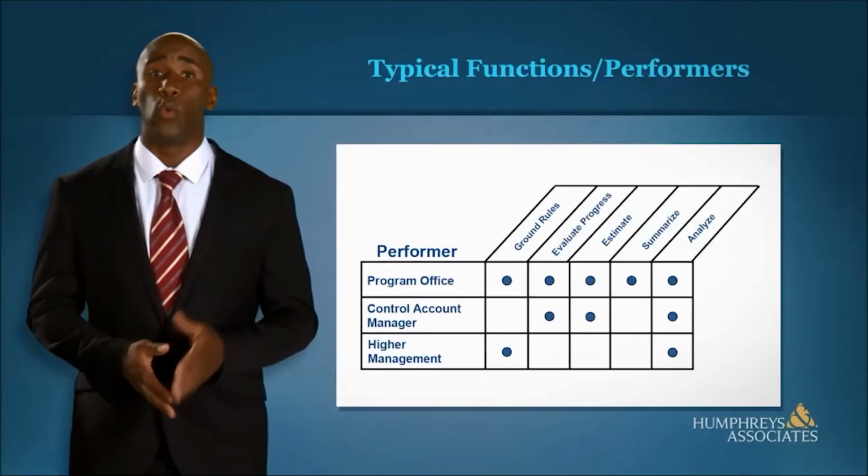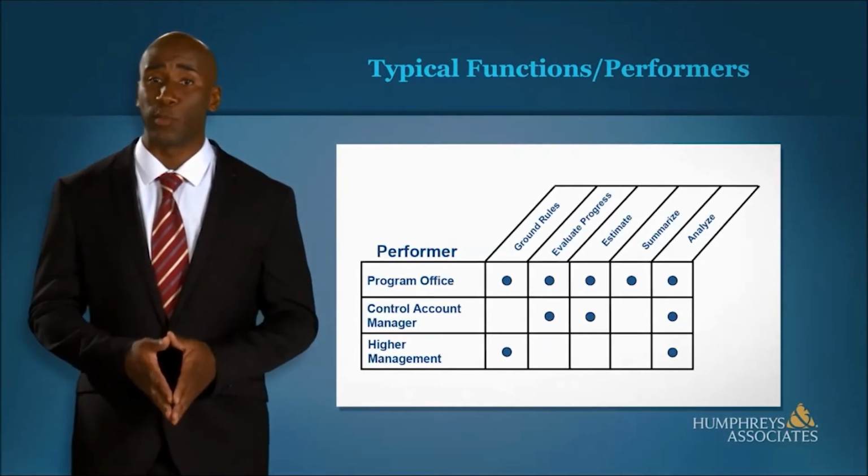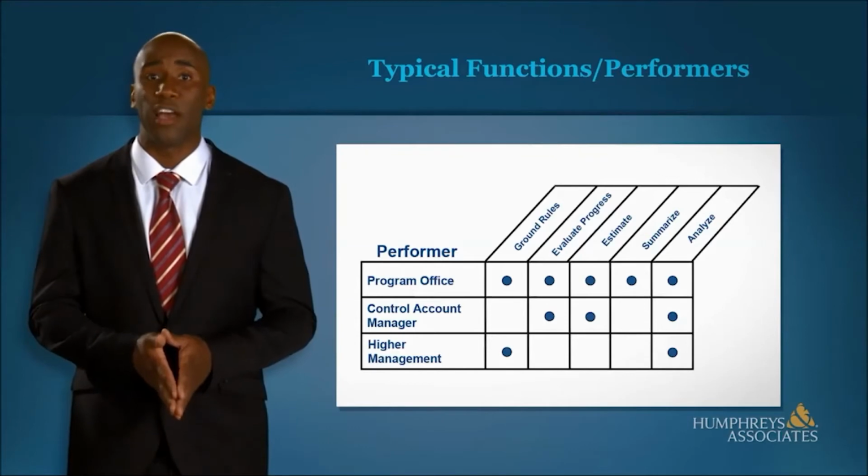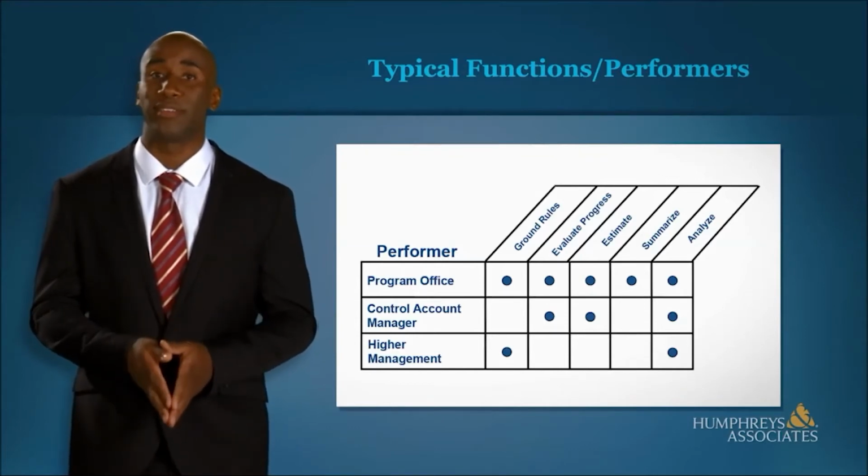Monthly EACs are assessments between periodic comprehensive EACs. The monthly EAC is a way to keep the EAC and project status current. One of the reasons a comprehensive EAC is more complex than a monthly assessment is because it is a bottoms-up estimate of the work remaining to be performed.